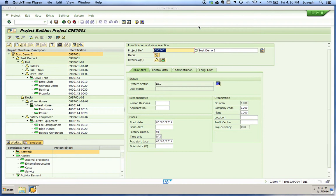In the graphic titled 'Types of Dates SAP Calculates and How Float is Determined,' you'll see which types of dates are supported by which project object. First, we're going to look at basic dates. Basic dates are planned manually or from scheduled dates and can act as constraints for network scheduling. They have binding characters for time scheduling in related areas such as capacity planning, reservations, purchase requisitions, and all capacity requirements.